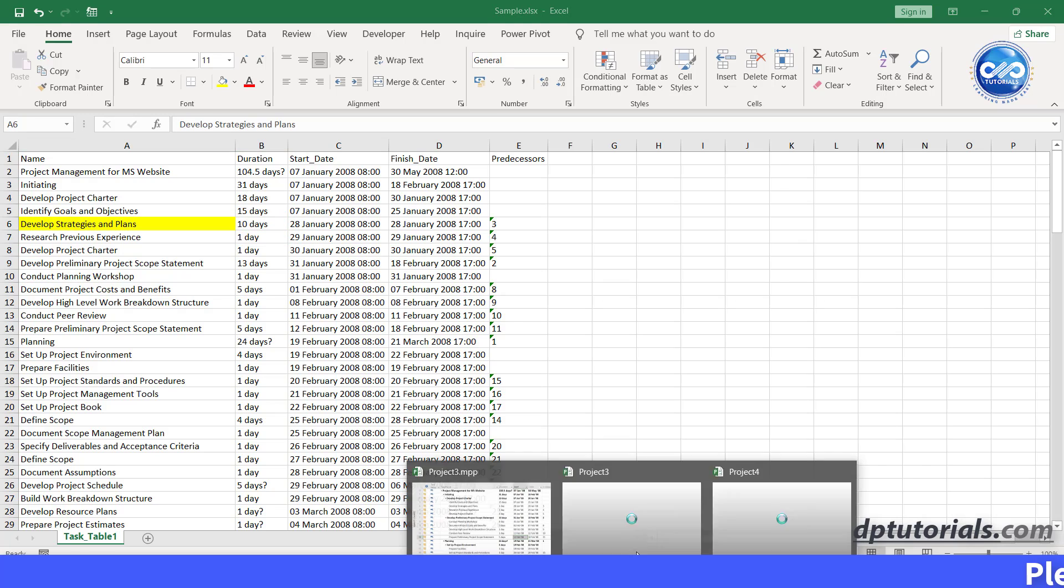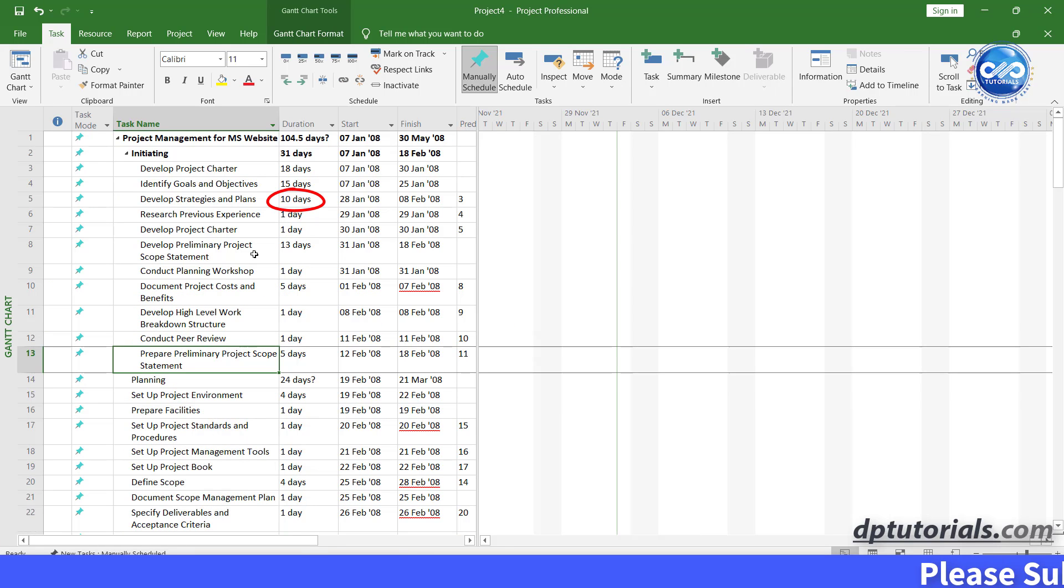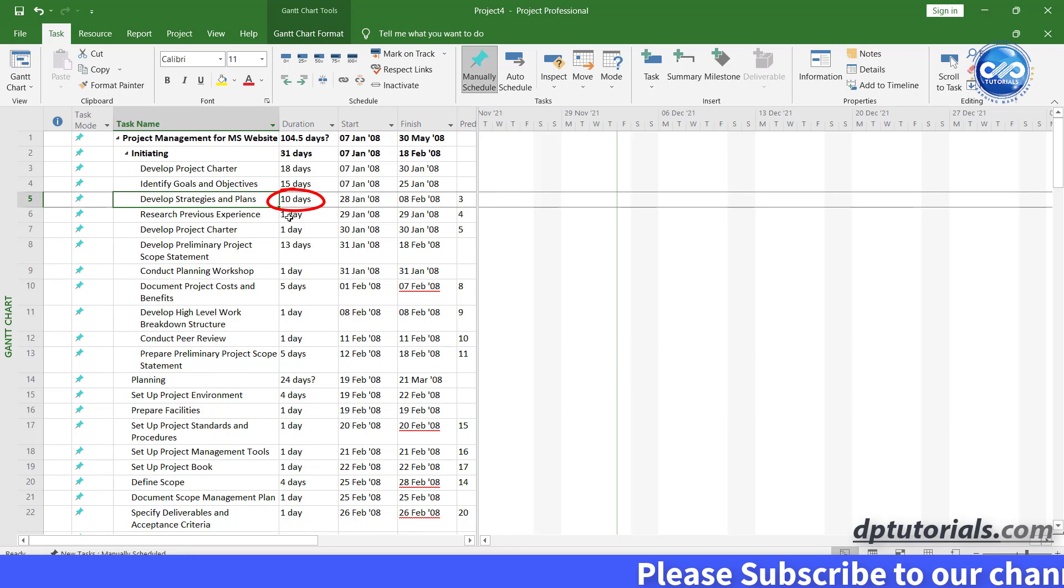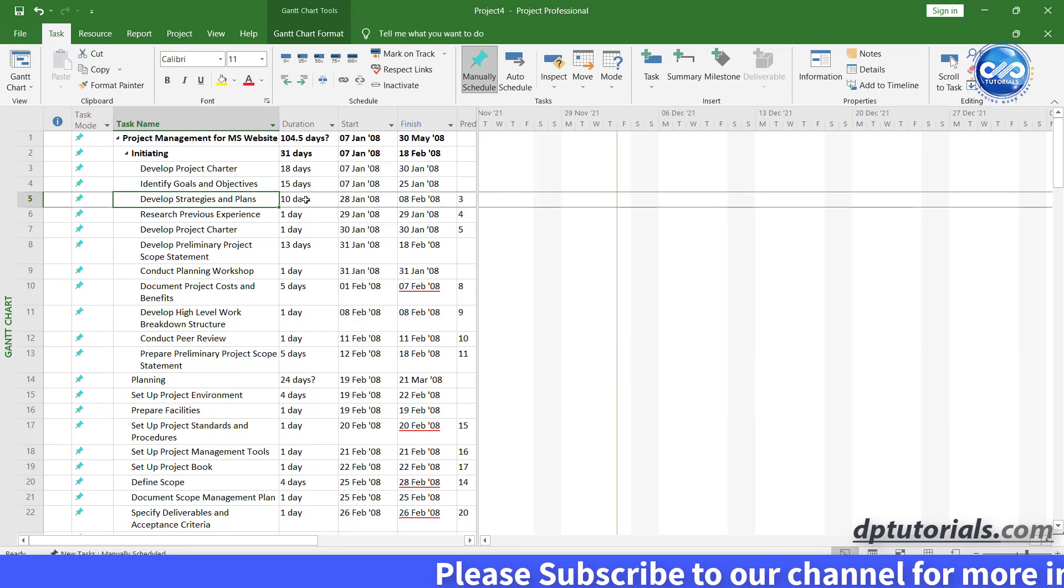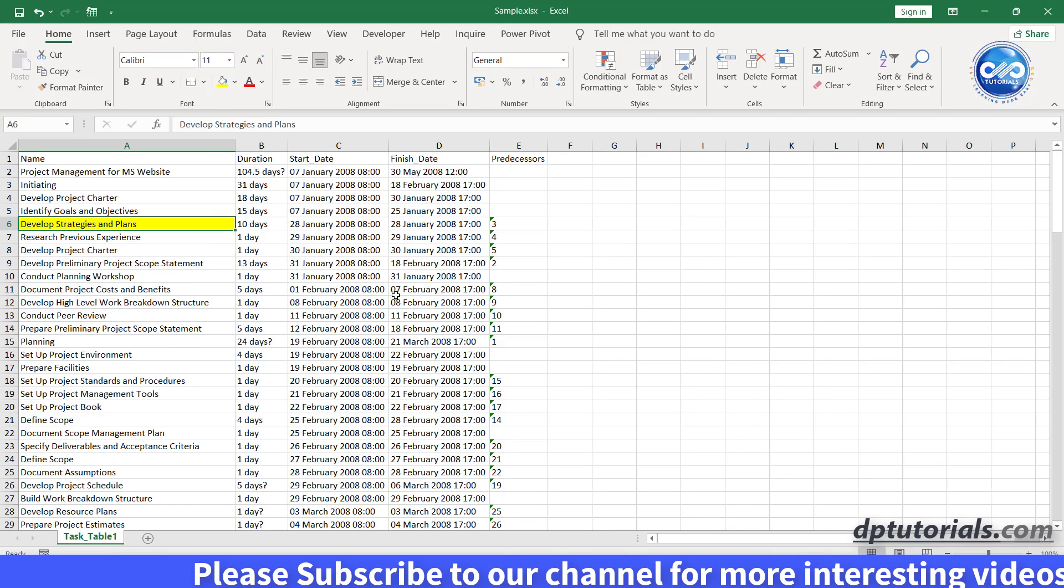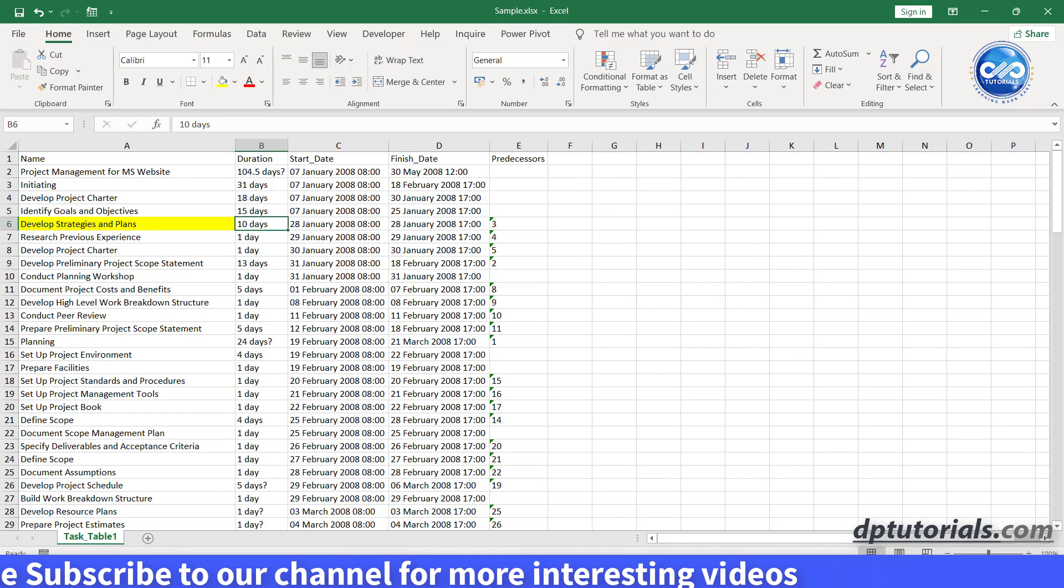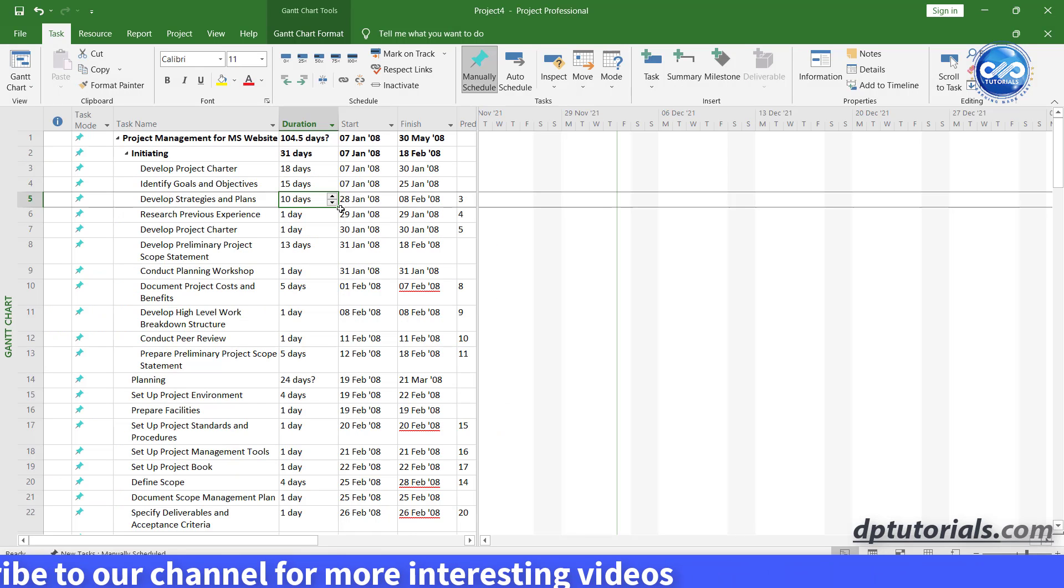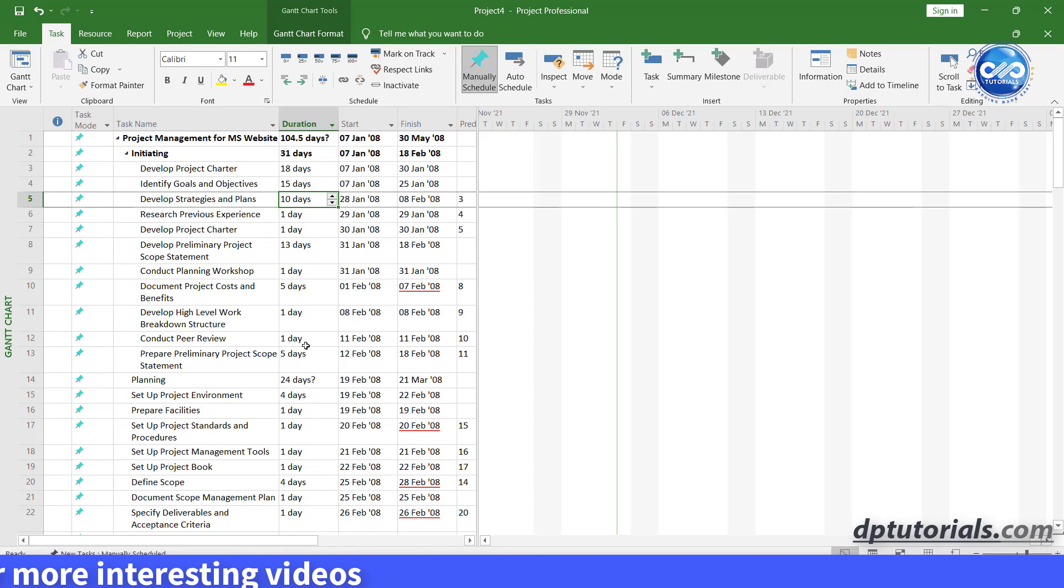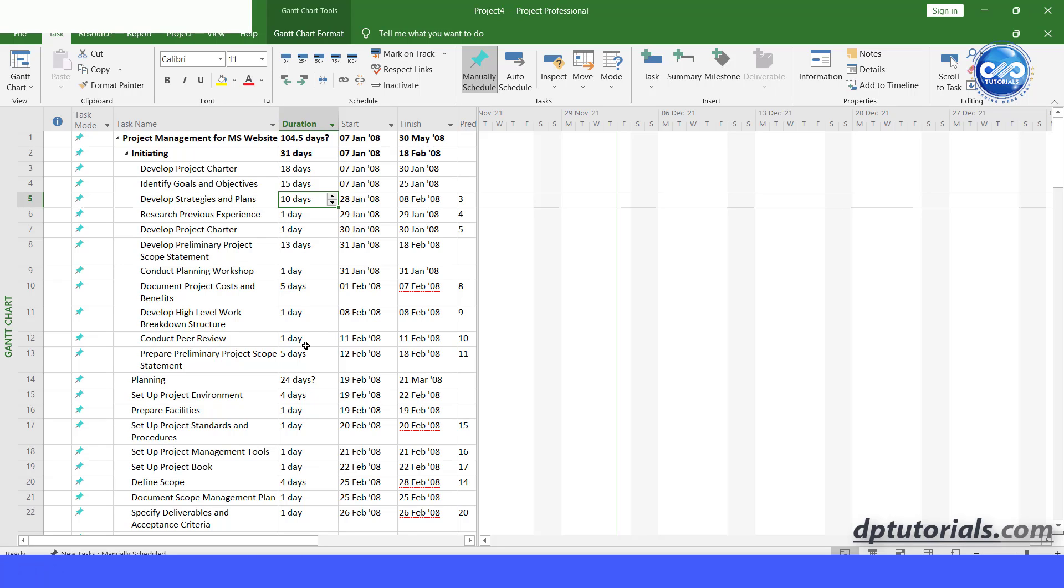Go to MS project and you can see the change in the second activity like this. So this is the live data and you can directly update status in excel and this gets updated in the MS project. So you can get excel updates from many users and directly paste the updated data into this linked excel so that your schedule gets updated so quickly.